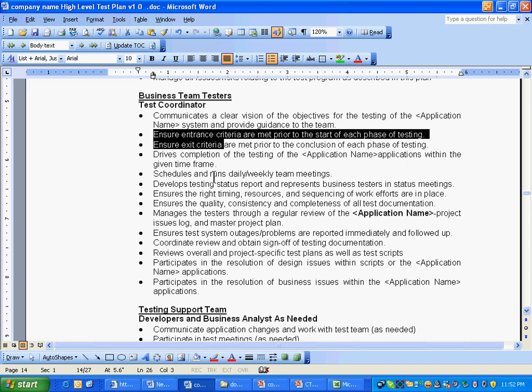And entrance criteria is developers have to say that the system is developed according to them. That's when you enter the testing phase, right? So this entrance criteria and exit criteria is of the testing phase, the whole testing phase. So there is a certain criteria, maybe like this, let's say there are 100 test cases. They might say if these 2-3 test cases are failing, we can still accept the system, we'll exit the testing.